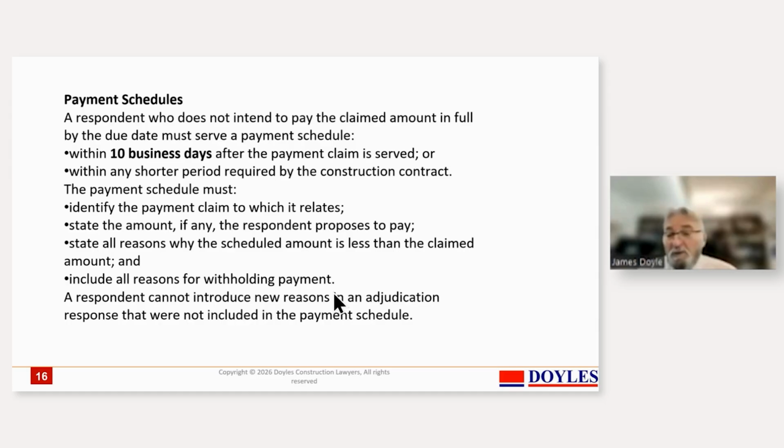There's no point in putting down a reason to say he was hopeless and I didn't trust him and fundamentally he never showed enough skill to deal with the thing. That won't cut much ice with an adjudicator. You've got to say, right, Condition 7 said that he should have had the excavation of this slab signed off by the engineer before he poured the concrete. He should have said that the concrete shouldn't have been laid unless the engineer had given us a certification about the reinforcement.